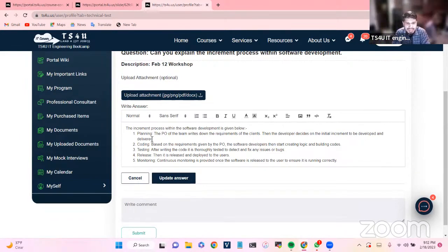So as a development team, we do the planning based on the higher priority user story, because in the planning meeting, not all the user story is estimated. Only the high priority user story, business analyst or the product owner bring on the sprint planning meeting. So we estimate every user story, and then we start actually working on the user story based on the commitment we made.